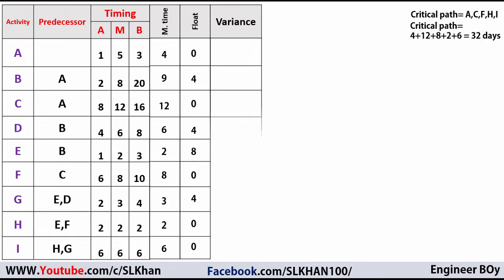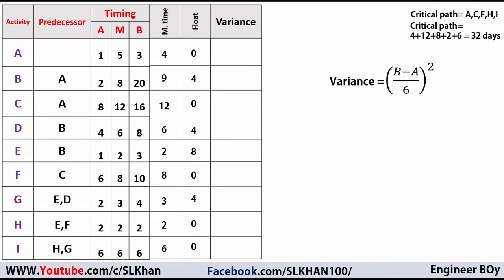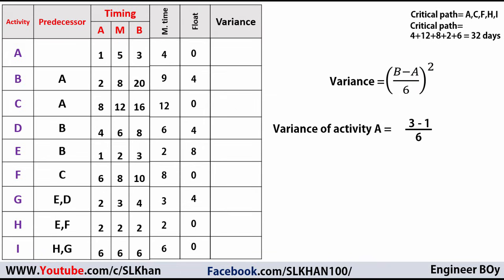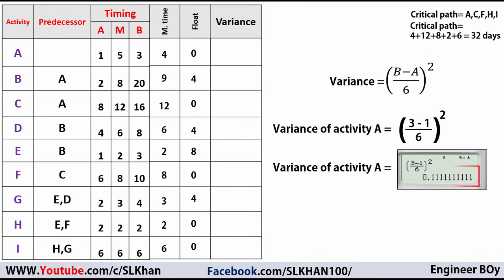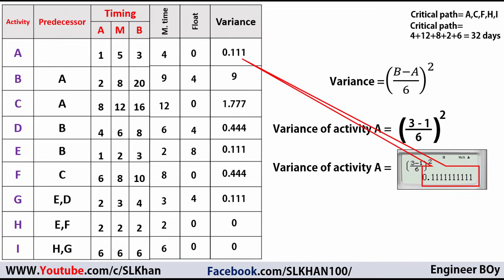Now I'm gonna calculate the variances for each activity using the formula: ((b − a) / 6)². For activity A: (3 − 1) / 6, whole squared, which gives 0.111. I'll plug this value in the variance column for activity A, then apply the same formula to calculate the variance for each remaining activity.